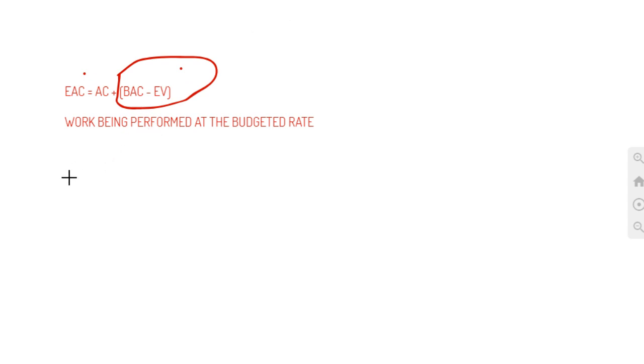The other formula I mentioned in the beginning was pretty much a similar formula, but broken down it becomes EAC equals BAC divided by CPI. So if you find the cumulative BACs, okay, and you find the cumulative CPI, you can use this to find EAC, but bear in mind it is EAC based on the current cumulative CPI, okay? And we can actually play with these if you want.